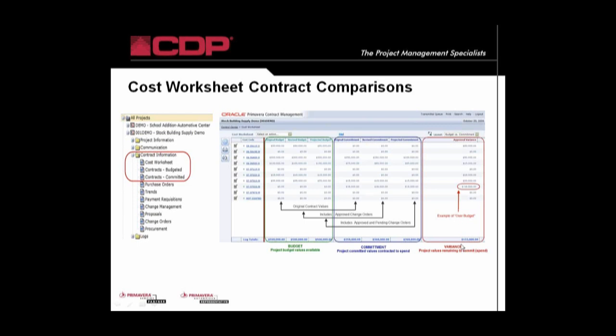The variance shown here in this column, circled up, shows you an example of over budget. So the variance is showing you what you have left to allocate. If it were a negative, it would mean that you had over allocated some money in that particular code. Okay? It may not mean that you're over budget overall, but you may be over budget in a single cost code, and we'll take a look at what that looks like.